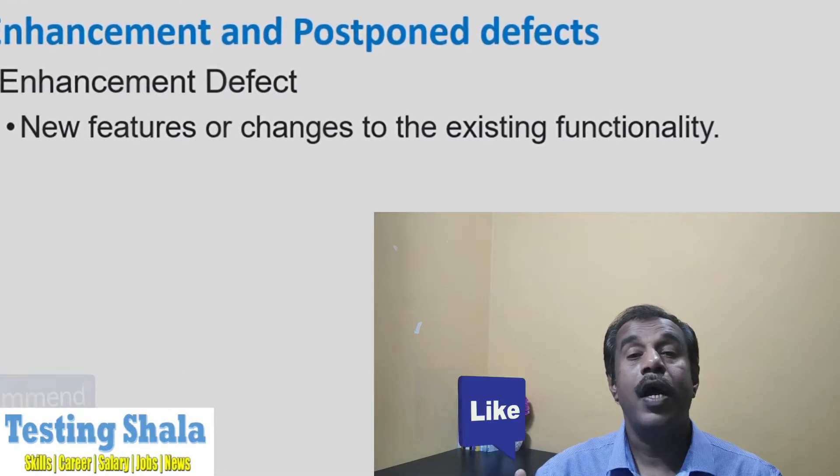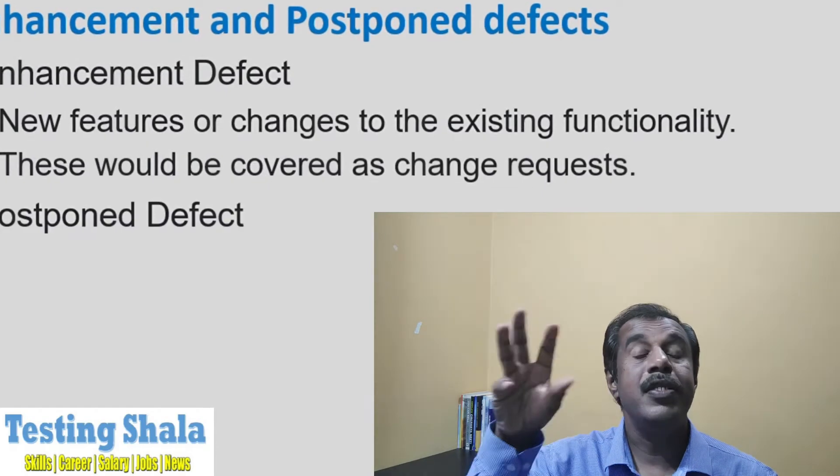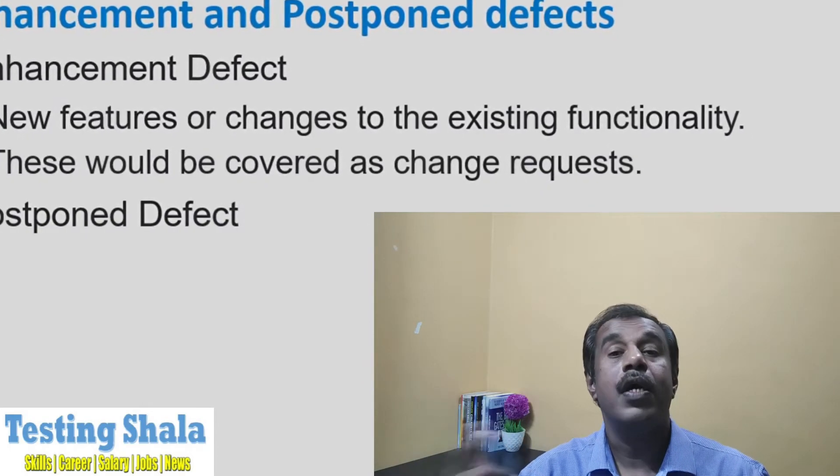We can bring that good feature in our next release, because it is a genuine defect and adds a lot of value. They will mark the defect as an enhancement defect and defer it to the next release cycle, so that whenever they pick up the next phase requirements, they will also consider these defects as part of the change request.